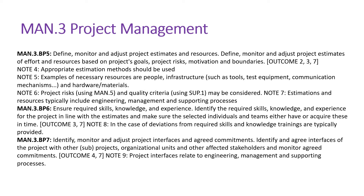BP6 talks about ensuring required skills, knowledge, and experience. Identify the required skills, knowledge, and experience of the project in line with the estimates, and make sure the selected individuals and team either have or acquire these in time. This is essentially a competency matrix or skill matrix. You need to form a team where all members have enough technical knowledge or skills with respect to the project. If someone lacks knowledge or skill, we need to provide training to bring that particular resource up to capability.